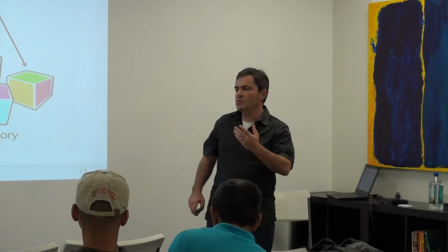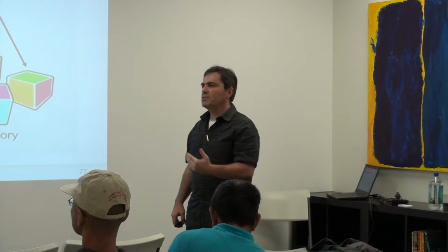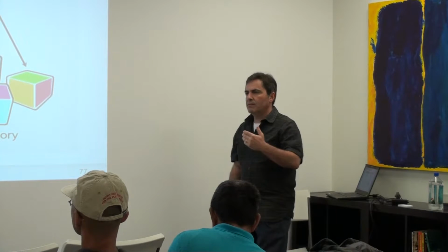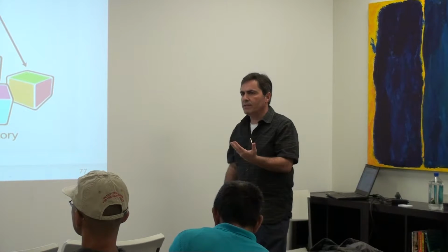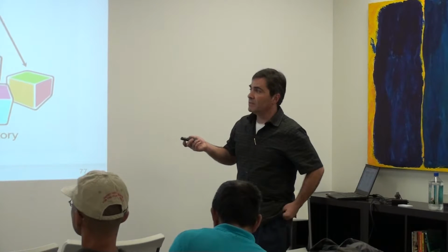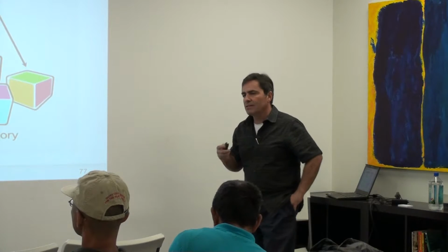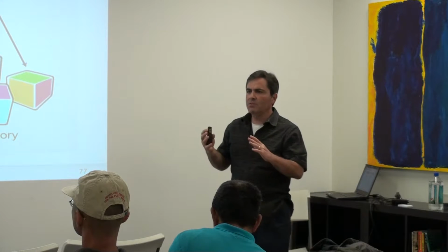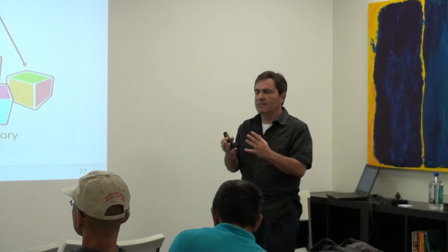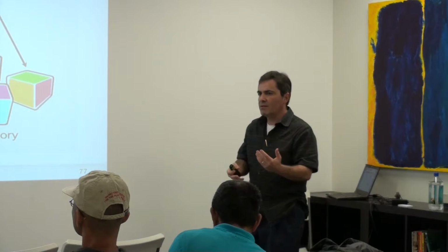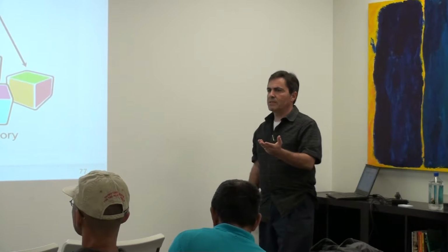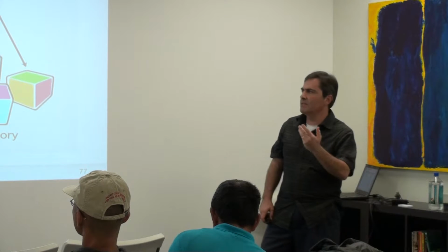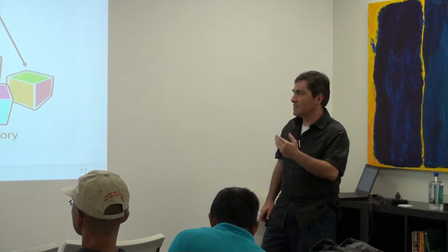The rule of thumb is you want a user story to fit well within half a sprint. So you want user stories to be about 3 to 5 man days of effort, if you want to see if you've got the right size. Any user story in your backlog that's bigger than that needs to be split up. So the question is, how do you take a user story and split it?